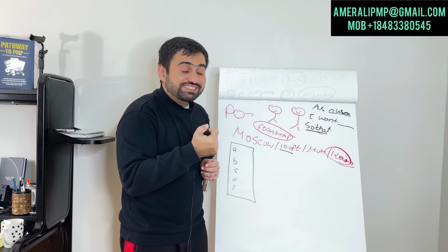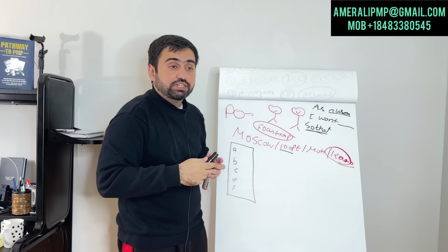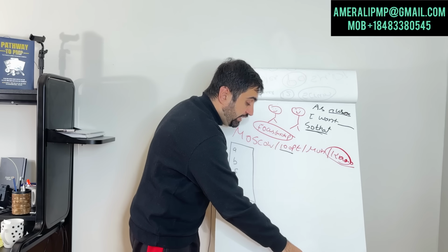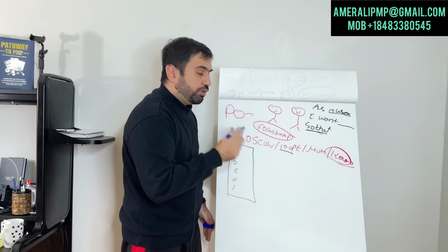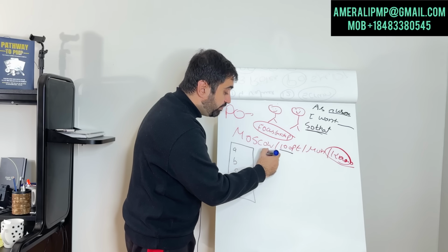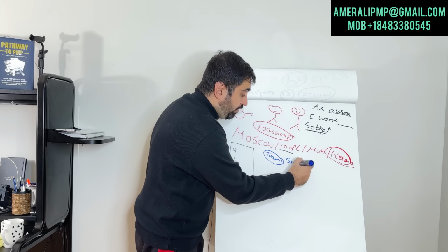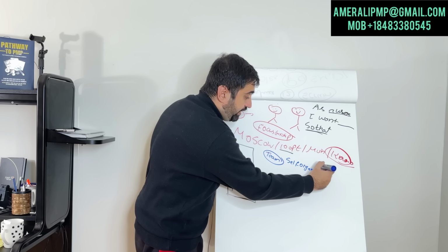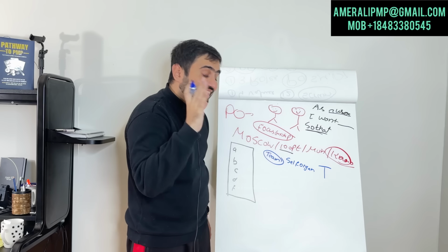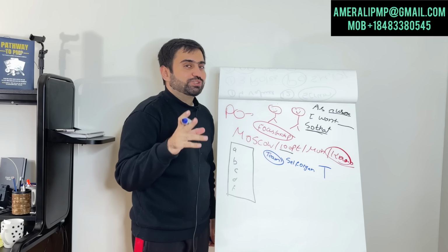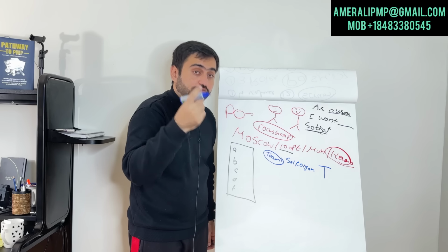What are the features that delight the customer? What are the features that are expected and must be present? So we will look at all those features in the requirements and we will prioritize according to that. In simple words, we have prioritized the requirements. Now the team, which is a self-organized team. What do I mean by self-organized team? They are T-type leaders having in-depth knowledge of one thing and cross-functional knowledge of others. They will decide how the user story will be completed. Very critical concept.